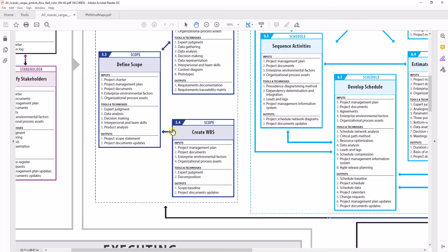To make paratha, I first need to get some vegetables, for example potato and all these things. I need to mash the potato. At a high level, I need to have potato puree. Such kinds of things, right? You are breaking down your high level scope in a very structured manner. So the work breakdown structure is a very structured breakdown of the high level work that you have, done in a very hierarchical fashion.